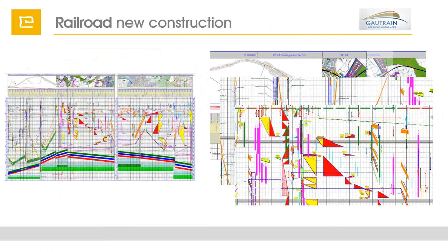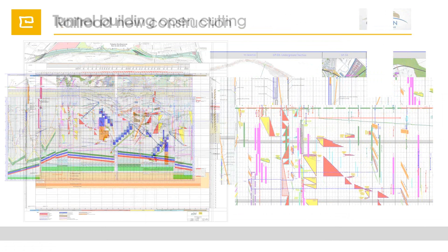Here is another sample from a tunnel that was built in Norway. They were also using the exact quantities based on distance profiles to calculate the durations of these tunnel sections that were built in open cut.